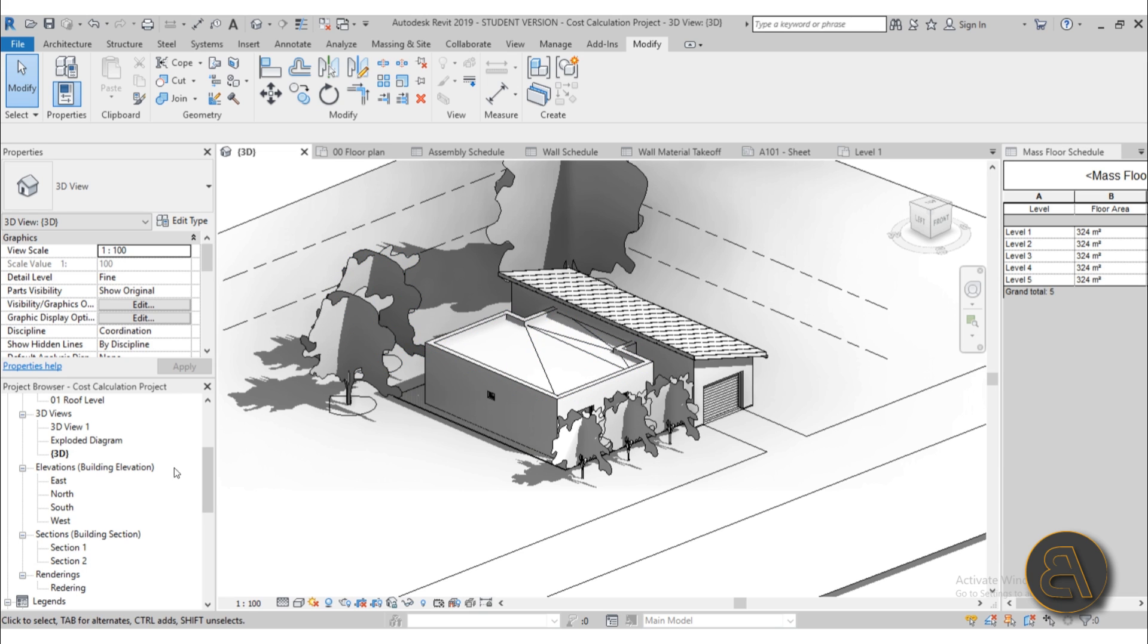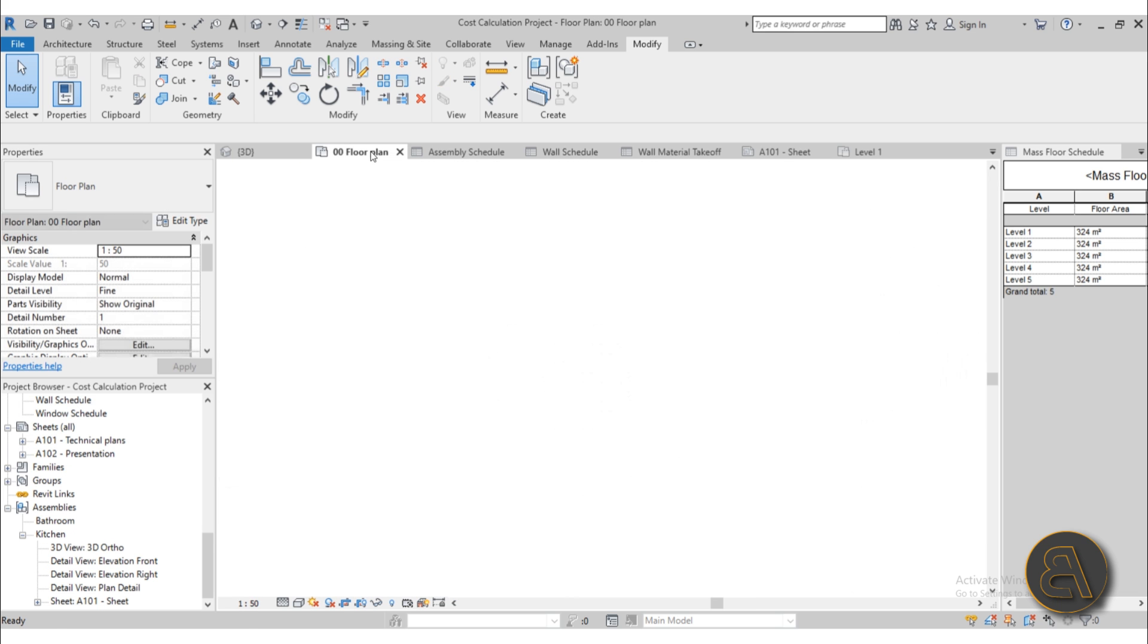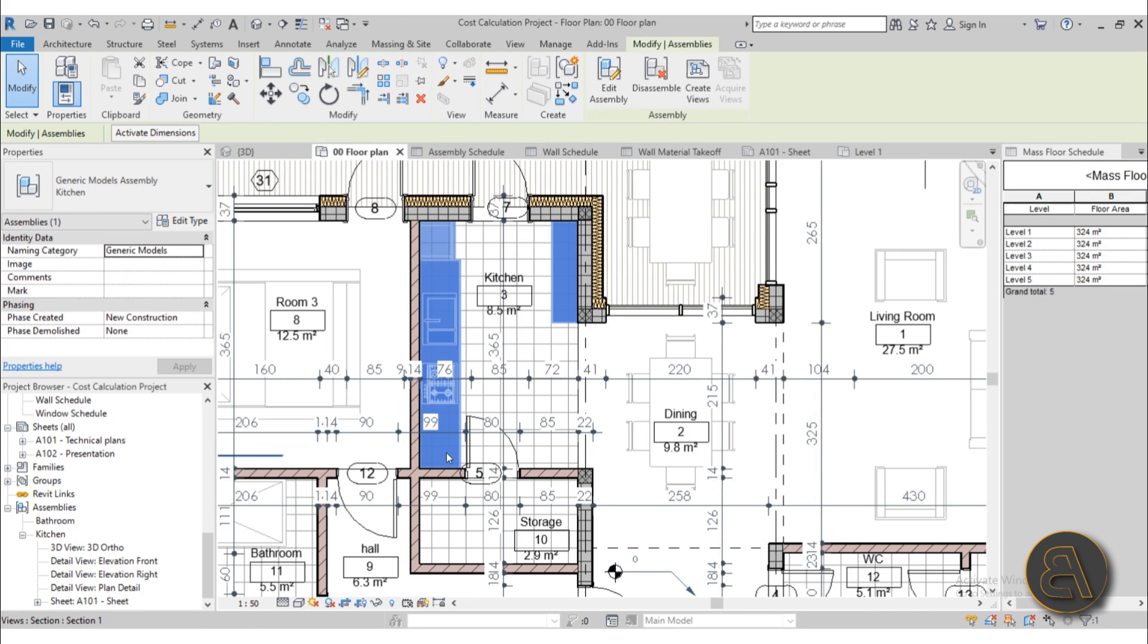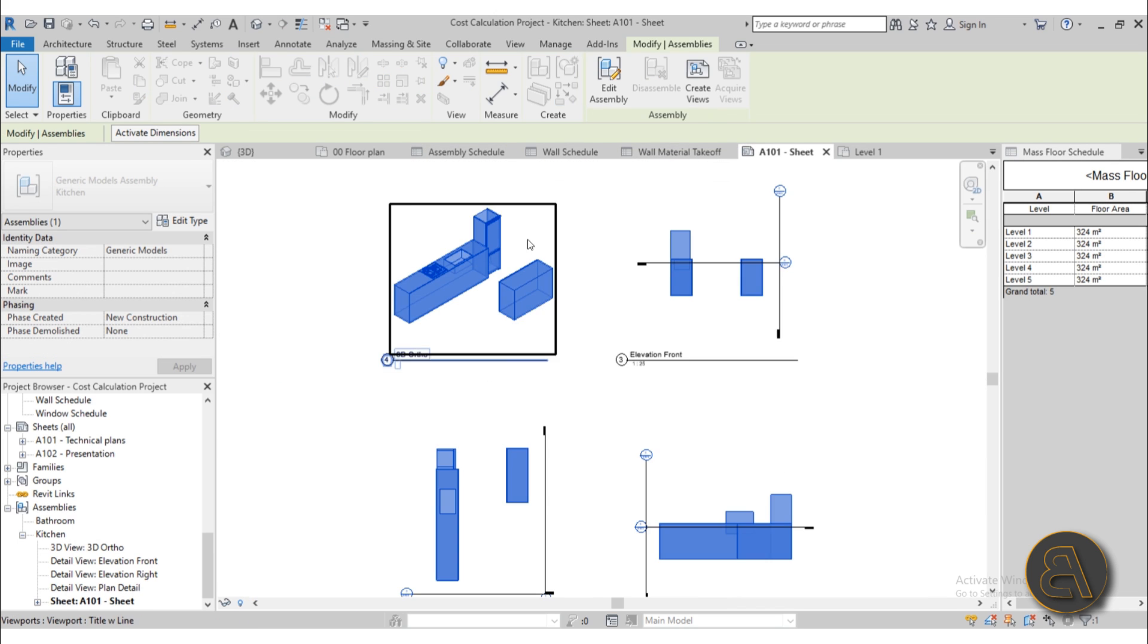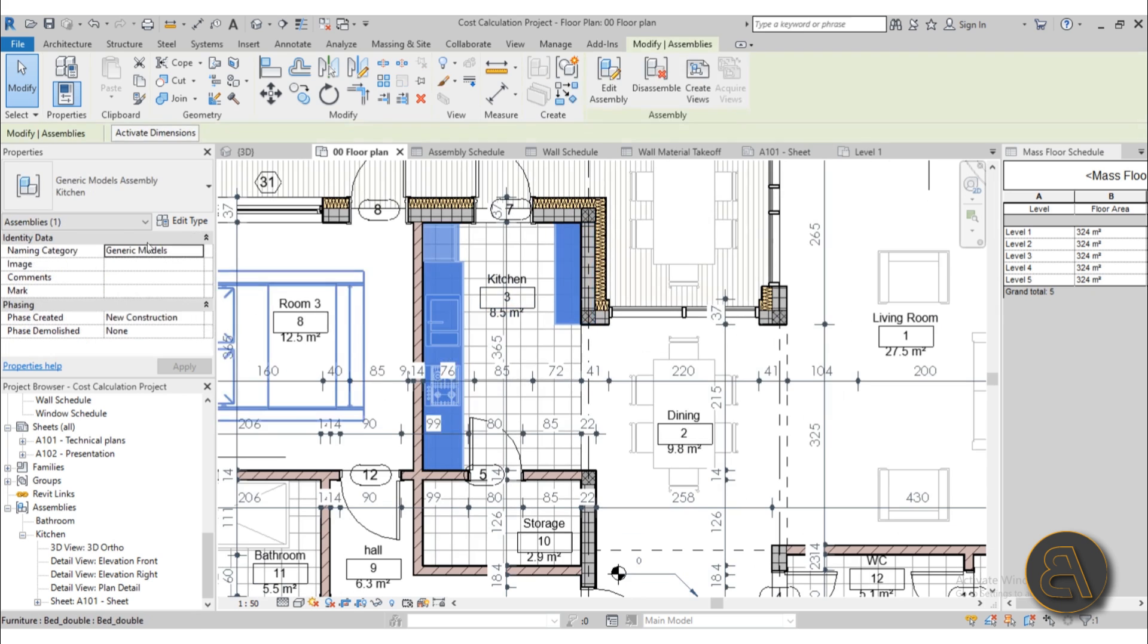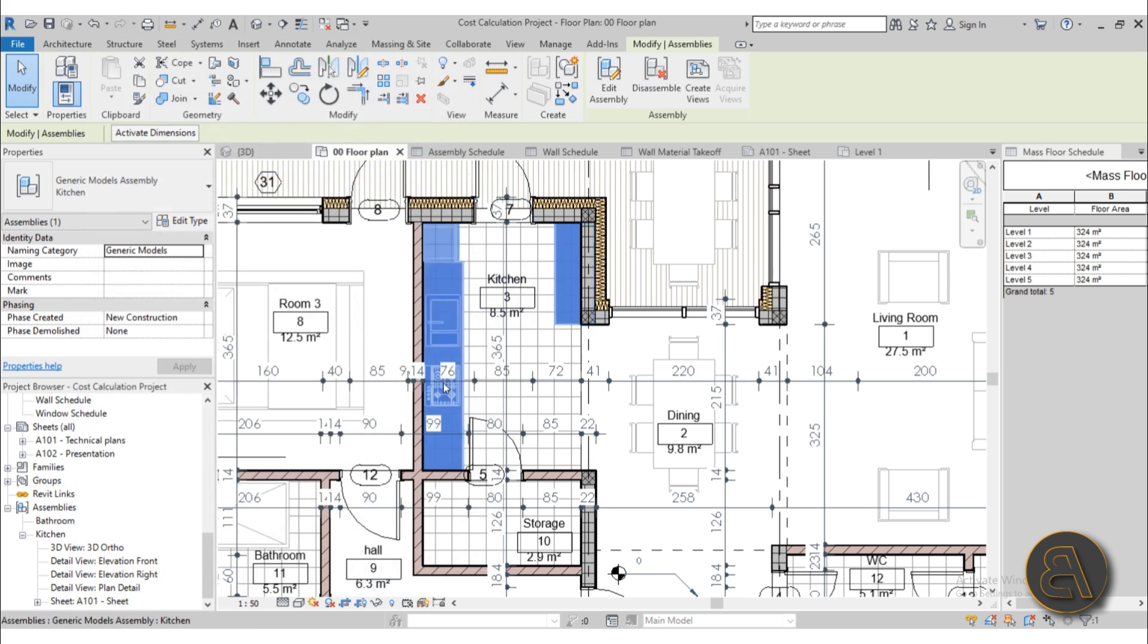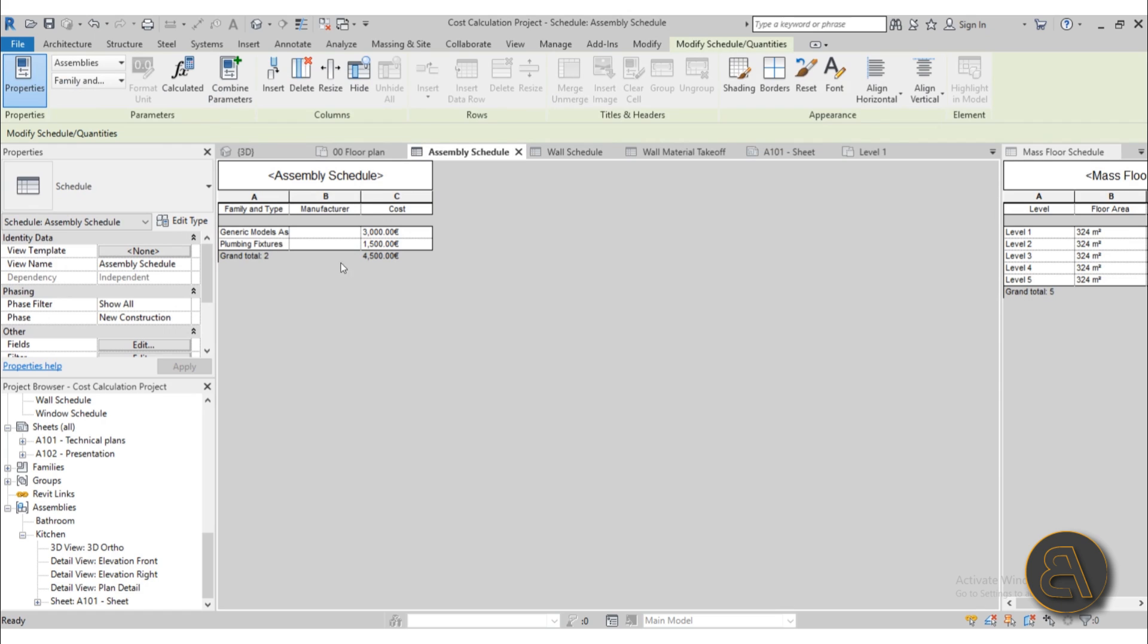So I start off by talking about assemblies, one of the tools that you can use. Assemblies - here in my project browser you can see we have assemblies, and in this case it's going to be assembly for the kitchen. So we basically group our kitchen as an assembly, we categorized it, and then we've also created an assembly sheet where you can give this to some manufacturer that does custom kitchens and they can quote you a price. Then you go back over here, select the assembly, and here we have that price inserted. Also you can then schedule the assemblies - currently we have assembly for the kitchen as well as the bathroom. All of those elements that you can group together as certain spaces and get quotes, you can then later put in an assembly schedule and here we have the total price for those elements for this building.